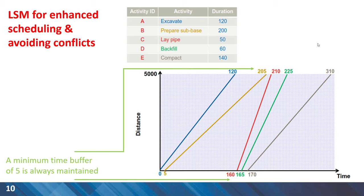Looking at activity D, because it is slower than activity C, we can consider the buffer for start time. And for the last activity E, compaction, because again this is slower than the predecessor activity D, consideration of buffer for the start time is appropriate. Starting at day 170 with the duration of 140, we have the finish time of 310 for activity E and for the project.